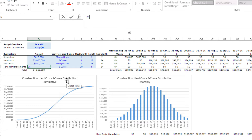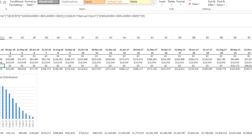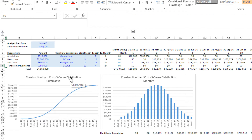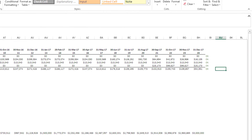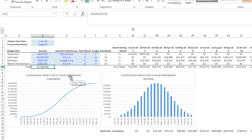Finally, tenant improvements. We're going to spend $250,000 and they're coming at the end — we'll build the building, then fit it out. We're going to start in month 21 for a four-month fit-out. It is an S-curve: the first month of tenant improvements is $25,000, the middle months $100,000 each, and the last month $25,000. When we sum those up and check out to the far right, it's OK — meaning the sum of these cash flows equals the sum of our budget items.